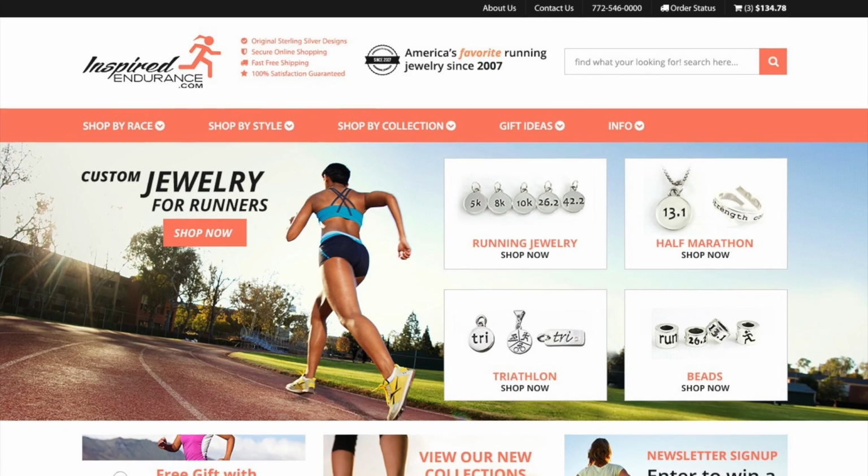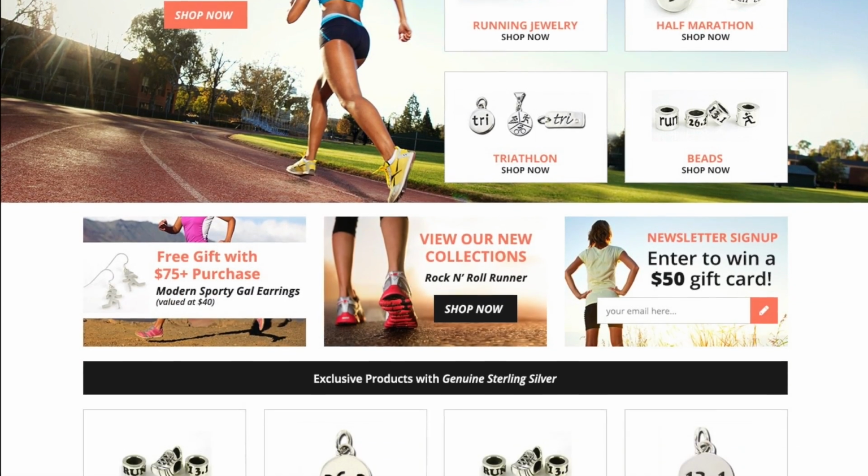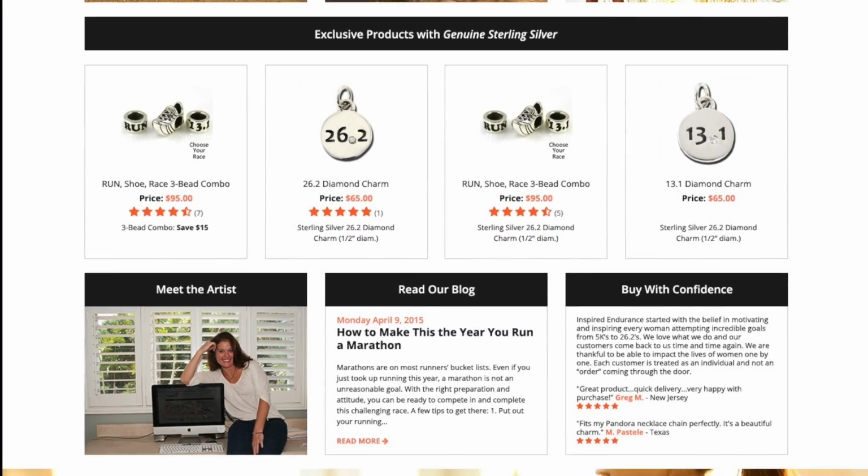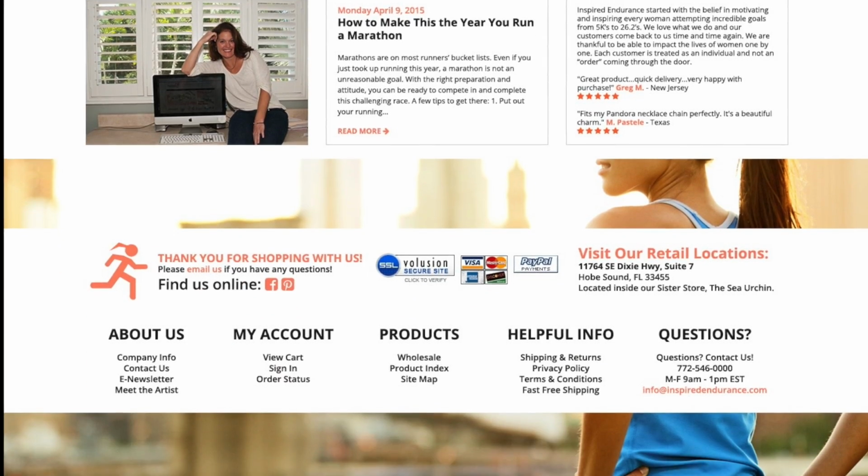For example, a common request we see from a client would be to ask for a modern-looking site with a responsive design. While a seemingly reasonable request, this type of approach actually makes judging the success of the project really difficult because of a lack of measurable benchmarks. Setting benchmarks allows you to physically measure how successful a project has become by comparing it to your overarching established goals. Setting easily measurable benchmarks is one of the cornerstones of a successful project.